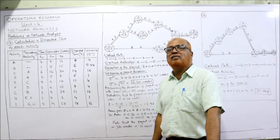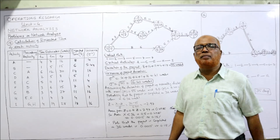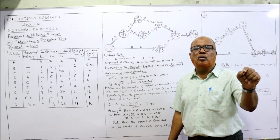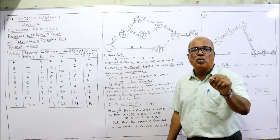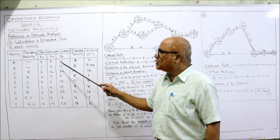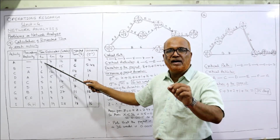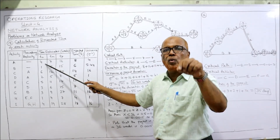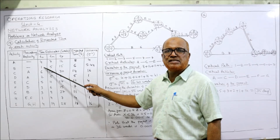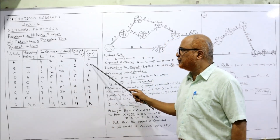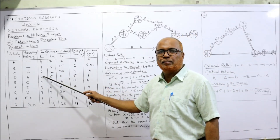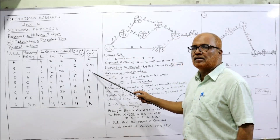Variance is required whenever we need to calculate probability, since this problem asks for probability. The variance formula is: Variance = ((TP − TO) / 6)². For A: (16 − 4) / 6 squared gives variance = 4. For B: (15 − 5) / 6 squared gives 5.4 (approximately). For C: (30 − 6) / 6 squared gives variance = 16. Calculate all variances similarly.